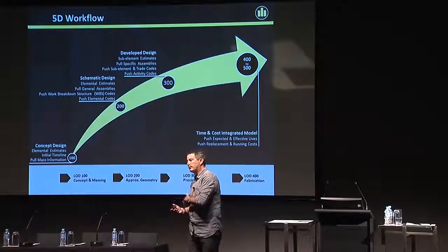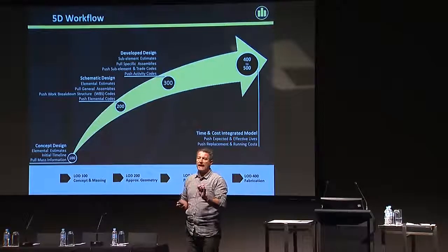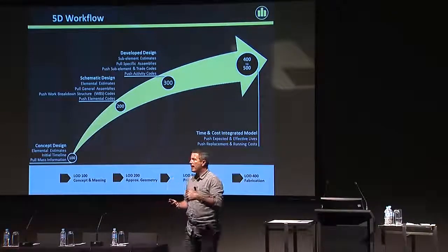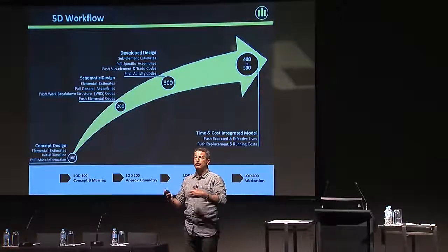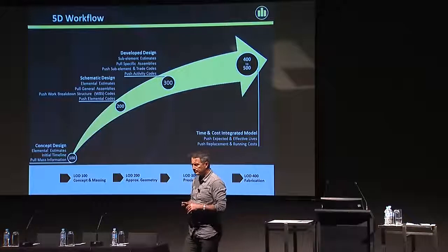The next phase is at completion. There's a view in the marketplace that if you capture the as-built cost, then you've got what you need for FM. And that's just not true. The reason for that is you're interested in things like the replacement cost of this building. If you demolish something, you don't insure that. So the money actually has to be filtered and classified as to where it goes.